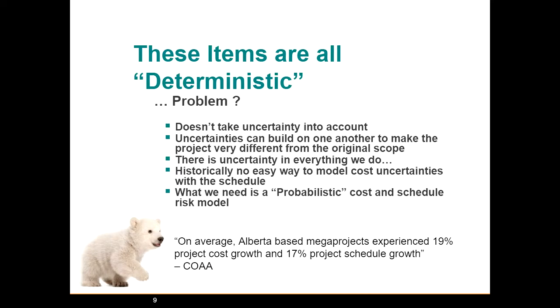So these things are all deterministic. So what's the problem with that? Well, deterministic values don't take uncertainty into account, and uncertainties can build on one another to make our end project very different from the one we originally envisaged. There's uncertainty in everything we do.